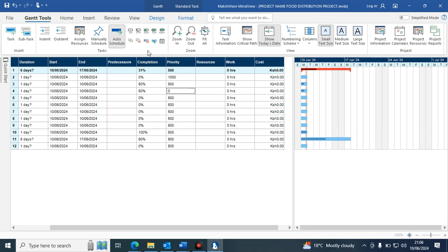If you can remember, there is a time we said that if an activity doesn't have resources, we can make it inactive. We can cross it. Do you remember? When you are crossing the activity, making it inactive in a way that it can now wait for resources, this is what we mean by this. Inactive task. You make the task inactive so that it no longer affects the schedule.